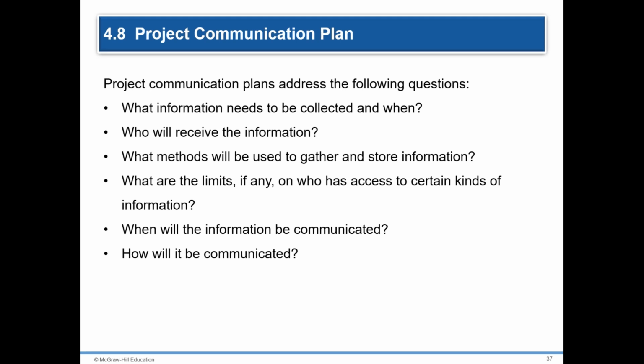The communication plan is usually created by the project manager or the project team in the early stage of project planning. Normally, it is used to answer questions like the 4W questions and a how question. So the plan maps out the flow of information to different stakeholders and becomes an integral part of the overall plan. The purpose of a project communication plan is to express what, who, how, and when information will be transmitted to project stakeholders, so schedules, issues, and actions can be tracked.